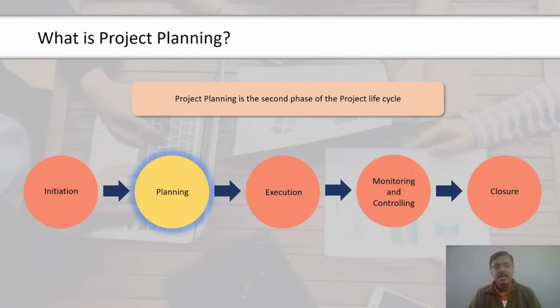So the understanding of this one can be had by having the work breakdown structure. Now many times I have seen whenever I use this term work breakdown structure, people straight away get into writing the list of activities and then organizing them in certain order. That is not the way to do the work breakdown structure. So whenever we start doing work breakdown structure, the first thing one needs to focus on is the deliverable.